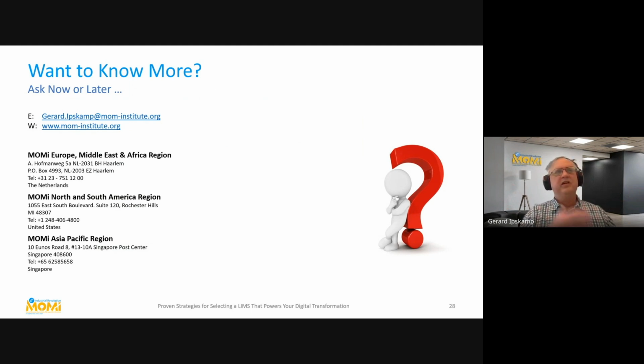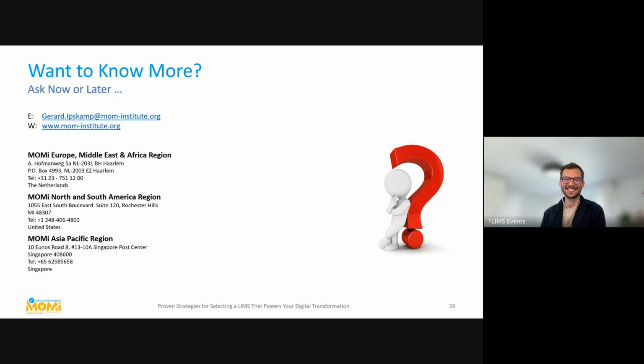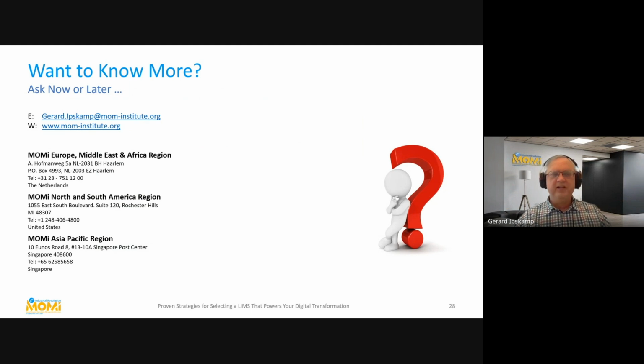The other thing is the reporting in the end. If there's a lot of reporting, then probably we need to discuss who needs what information and when before we start the selection. Because I did a project once where we stopped 25 reports in the old system, and we found out that only one report was really used. And it was around 100,000 guilders, before the euros, but it was a lot of money that they didn't have to spend on creating reports. So the start and the end are really a good indicator if they are ready or not.